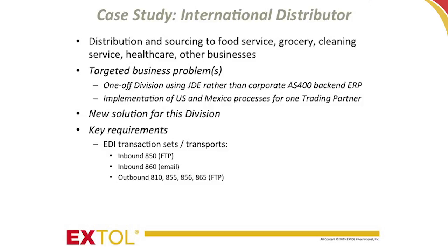And it's important that we have that buy-in from the business side so that everyone's on the same page. That person is leading the project and making sure that all of these pieces are working well together. We didn't have that in this case, and one of the issues that we dealt with was the amount of time that it took to develop the integration to the JDE side, because we didn't have the business answers that we needed, and we couldn't get the answers from that side of things. So that was a critical piece to this project, and I'll talk a little bit more about that on the other project as well.